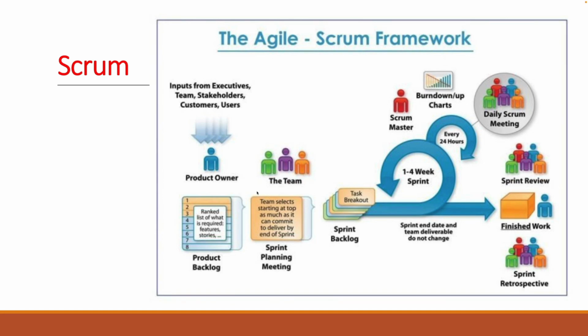And then we have a team, right? The development team, which the product owner is also a part of the team in general, it's part of the Scrum team. But you have developers who could be, not just programmers, but anybody who is contributing individually to the whole process. So they're going to pick off a few of these product backlog items and call that their sprint backlog. And this is done in sprint planning, where they determine how much of this long list of stuff can we actually get done within the next 2 weeks or however long your sprint happens to be.